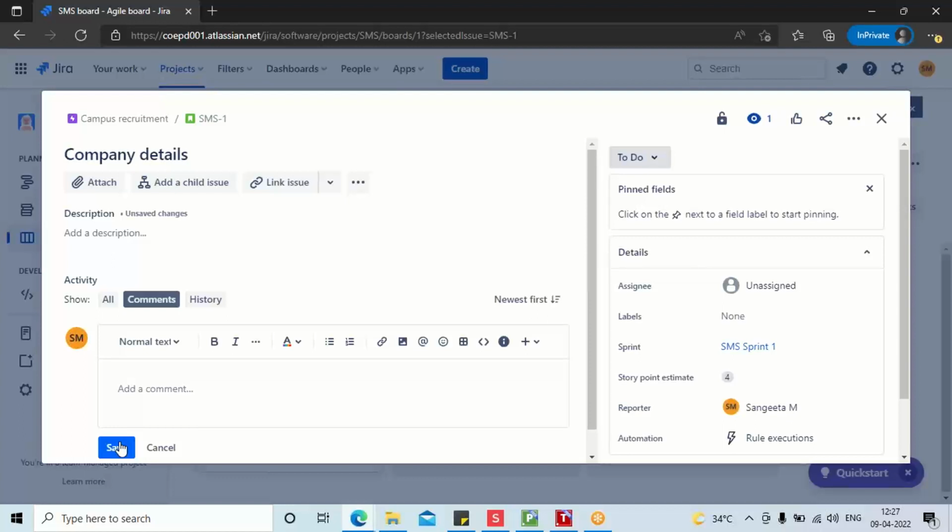And what about the business value? Business value point is not mentioned in this user story because this is what you use for sprint planning. You will calculate and prioritize the user stories on BV only.